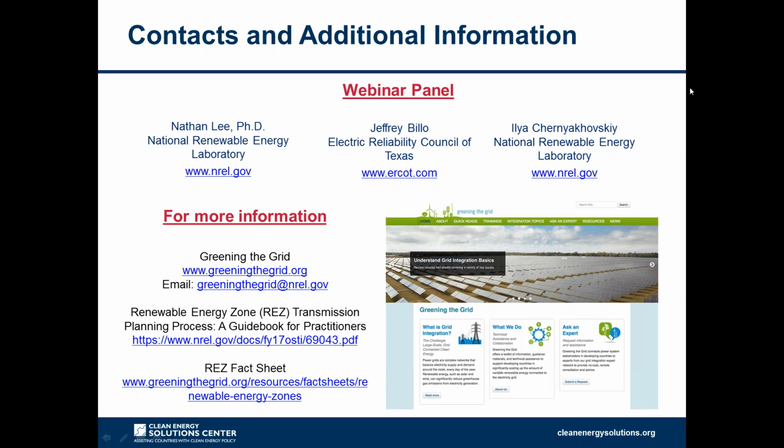Yeah, so in ERCOT, the way that the transmission is paid for is by consumers. We call it a postage stamp rate, where that is spread out across all of the consumers in Texas. And so in ERCOT, the developers really aren't responsible for any of the transmission costs. They do have to put up some security once they commit to build their generation facility, really to ensure that if they don't come, then the transmission facilities that have been invested to support their plant, that the consumers can recover that cost. But really, once they start putting power on the grid, they don't really have to pay for any of the transmission costs.